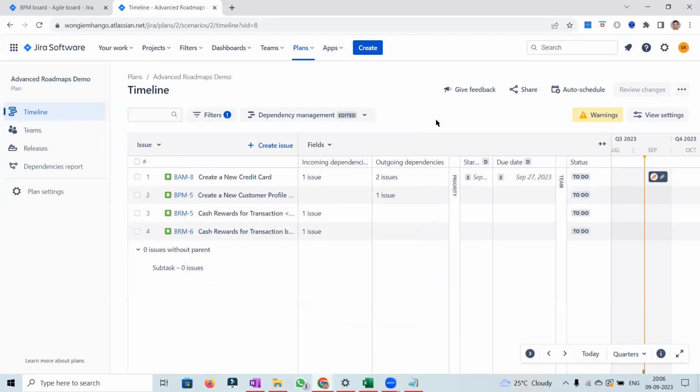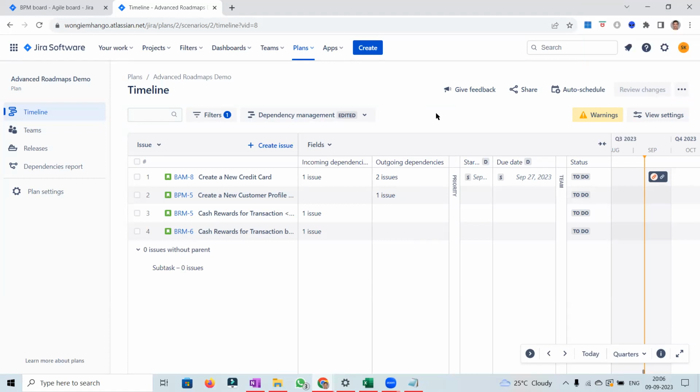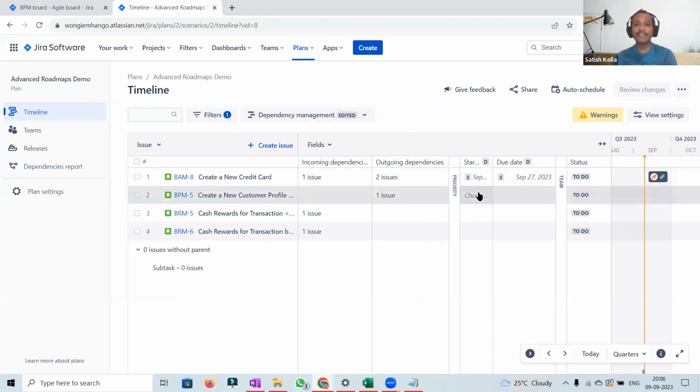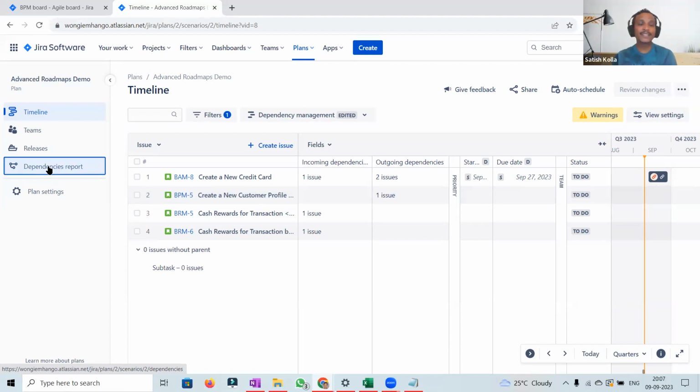Thank you. Okay. And the start dates, due dates as well help to get some more clarity on the dependencies report. Sometimes we need some fixed mandated dates. Even though we are agile, we all know how it works in real time, right? So especially like ATR, whatever is committed to the business, we can update exactly on that. Once we have that start date, due date mapped, that will reflect in the dependency report, and it will highlight as well whether we are on due or at risk. That also comes into visibility. Exactly. Let me go to the dependencies report.